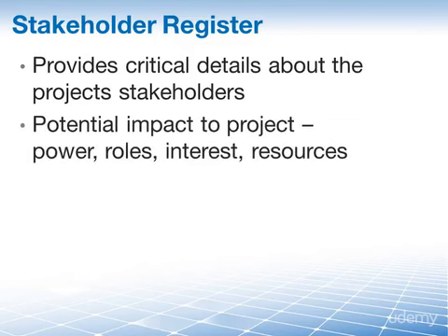Well, this document will inform you, the project manager, based on their power, title, position, level of interest, which stakeholders are likely to impact the project. Stakeholders with high potential impact will very likely need and expect to be involved in the planning of risk management activities, since they typically can provide or limit resources. Their ability to influence risk is substantial.